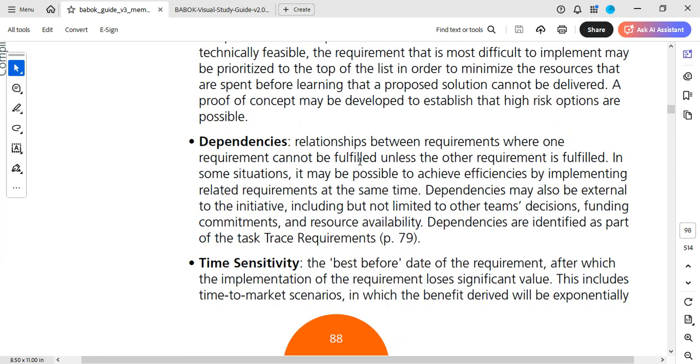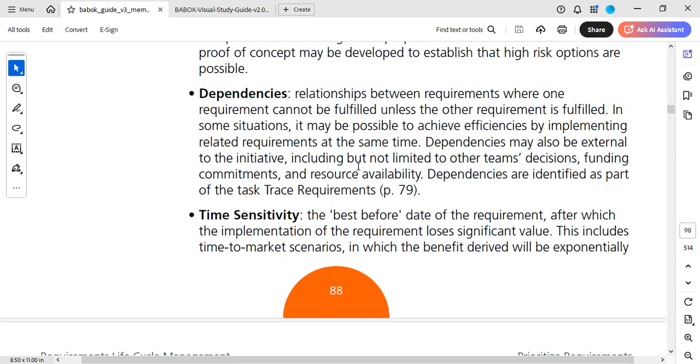Yeah, at times when you have a difficult requirement like this, or you don't even know how to go about it, you just go into doing a POC, that's proof of concept, whereby you are testing an idea to see if it's feasible. And if it's feasible, you see if you're going to do a pilot deployment, that is, test it with maybe one area. Then you see if at the end of the day it gives you the value you are looking out for. Then you go into implementing it in other areas. So doing a bit to just test an idea.